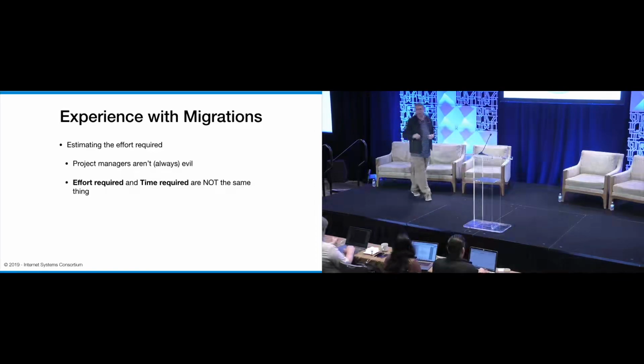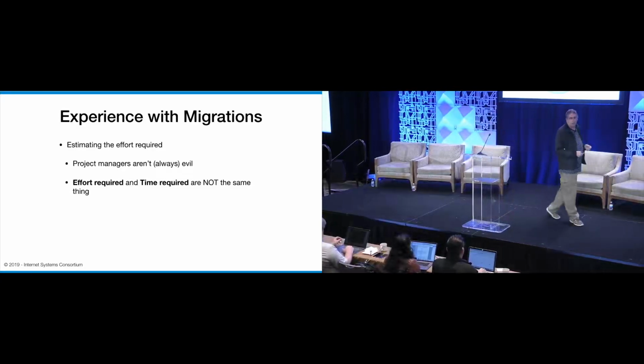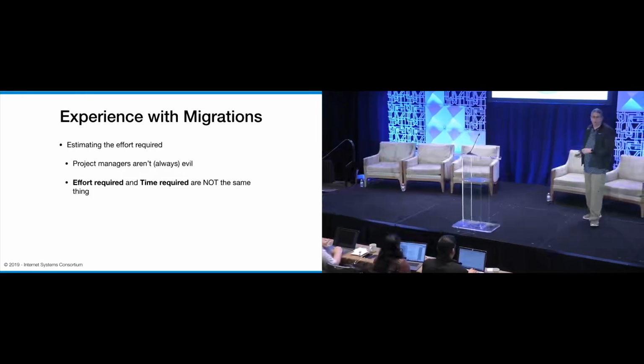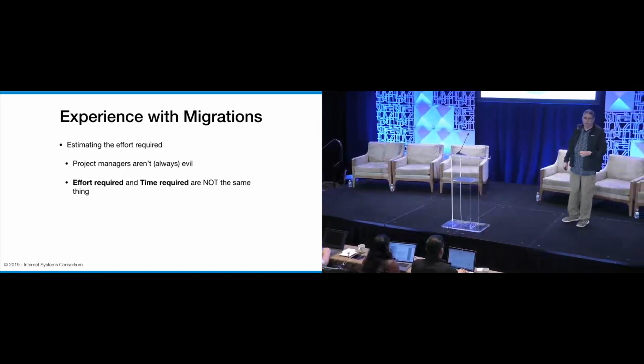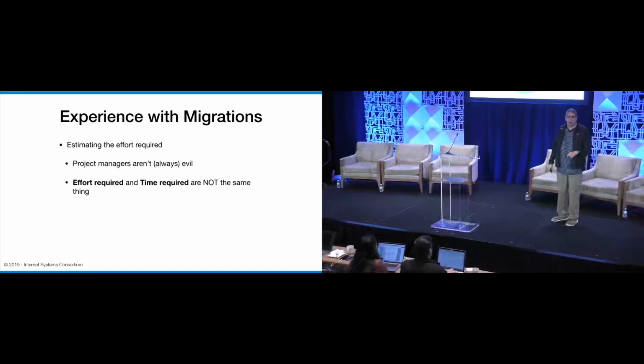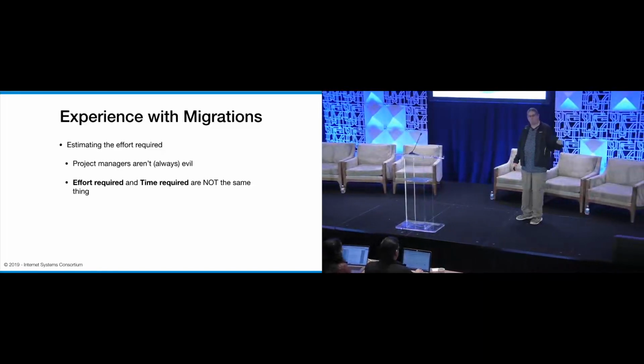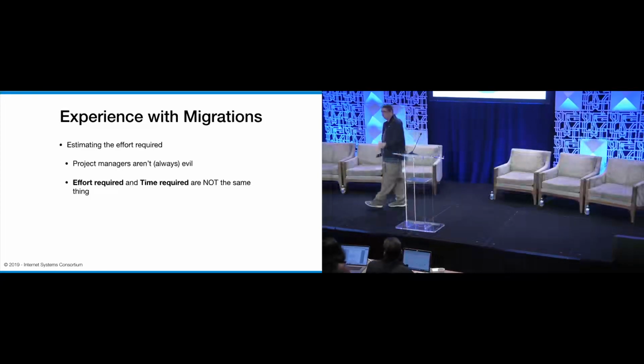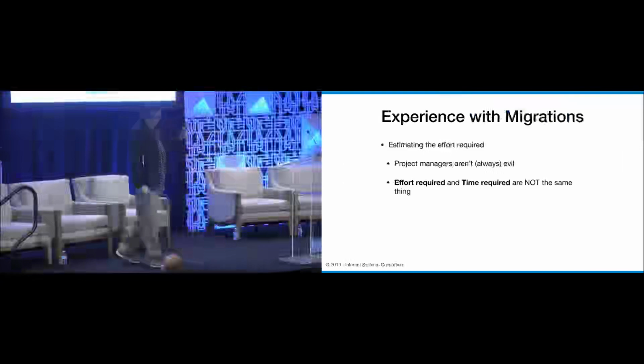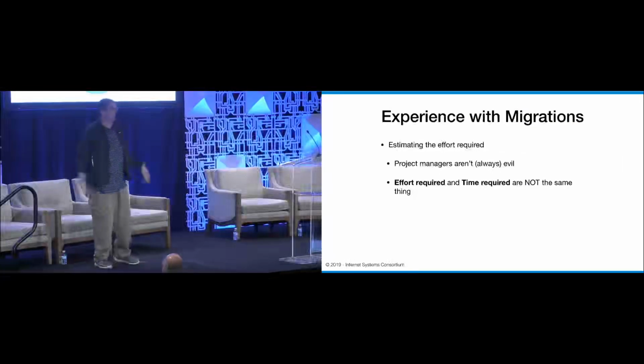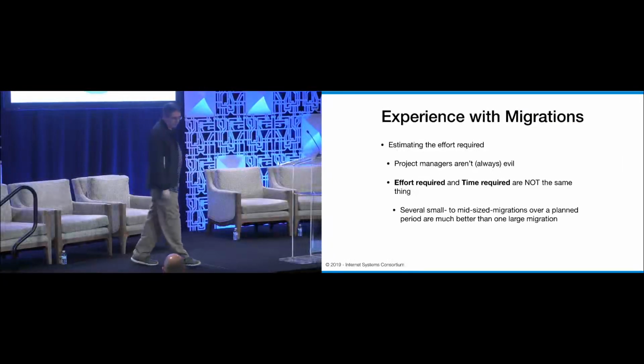The additional piece where the time comes in is actually getting the work done. If you have a multinational organization running across multiple continents, 3 o'clock in the morning here on a Saturday may not be the optimal time to do that upgrade if you're somewhere else. So be aware that the effort is going to be huge. The time is going to be a lot longer than you actually expect it to be.